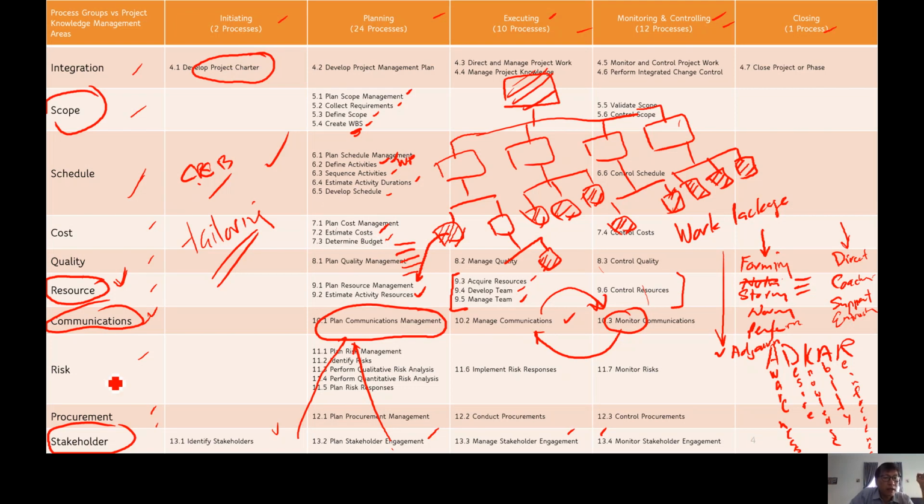I mean, if you're doing risk management, there is even more extensive calculation using quantitative risk analysis. We can actually establish how much money you need to set aside. Not just saying, oh, how much is this project? 1 million. Oh, let's set aside 10%. That's enough, 100,000 is our buffer for anything that may happen. No. If you're doing quantitative risk management, we can actually learn how many dollars and cents to set aside for the risk expectation of a project, rather than using this plain percentage. It's going to be very accurate.